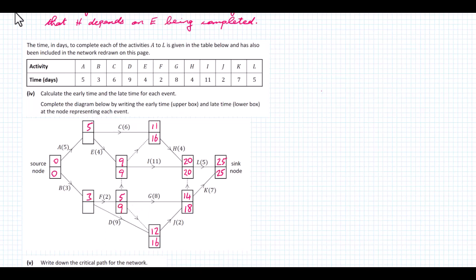Moving to this one here: 16 minus 9 is 7, and 9 minus 2 is also 7 — so we put 7 there. Up here we have 16 minus 6 which is 10, and 9 minus 4 which is 5 — pick the lower one, 5. So we put 5 there, and that brings us back to the start. That's the diagram finished.